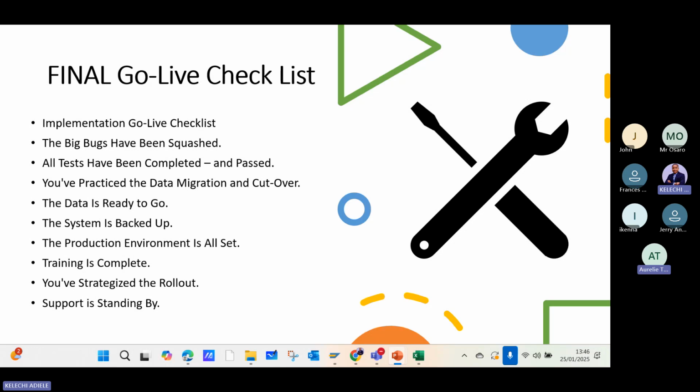That's awesome. Yes, that's a good question. Ideally, yes. So we have defined that December. That's why they don't want this project to go past January 31st, because number one is more workload for them. So what we are using as cutover date is 31st December or 1st of January. All the data we have brought in is as at that date. So what this means is when we go live, the balance they are going to have on the system is as at 1st of January.